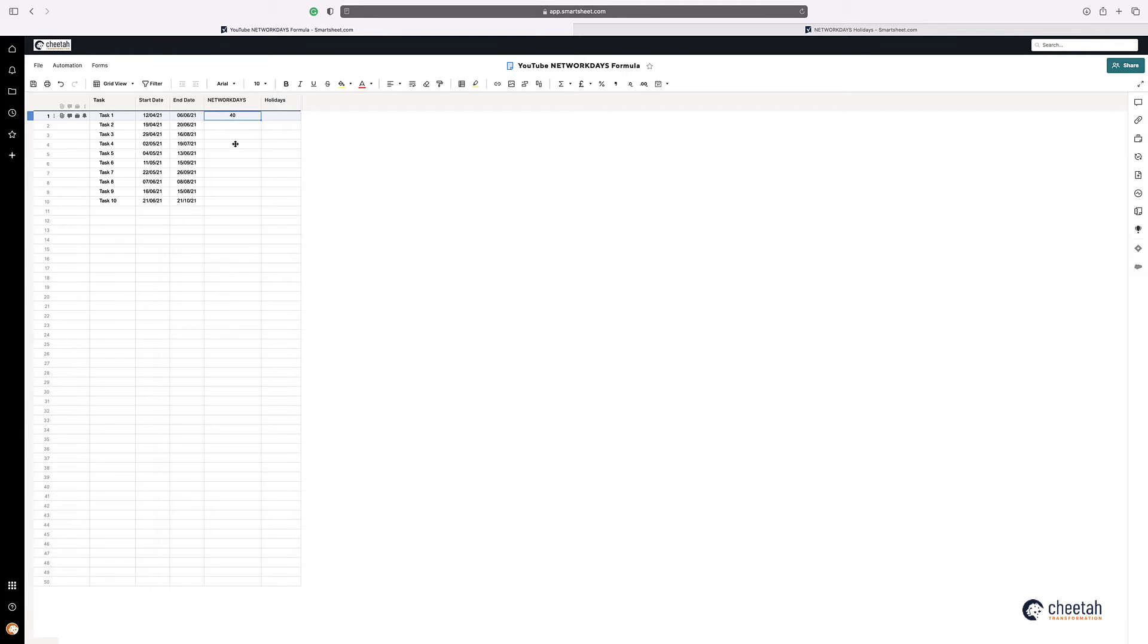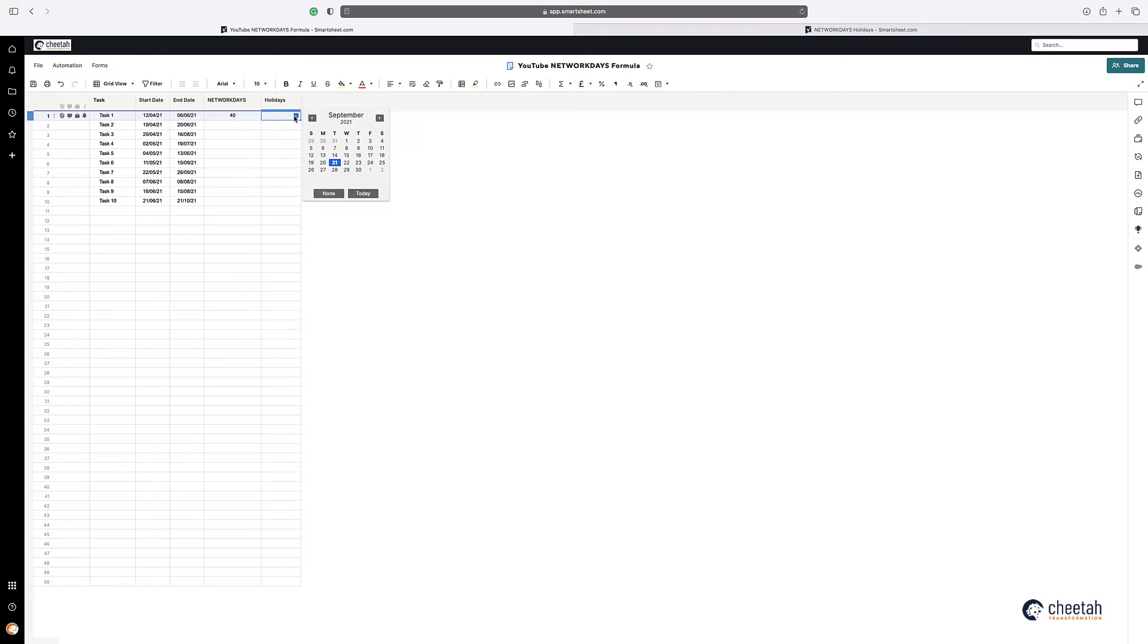One of the things that Network Days can also do, as well as Network Day, is if you have a holiday. So if I have a holiday, for example, within here, it can either be a bank holiday or a day that I'm not available.